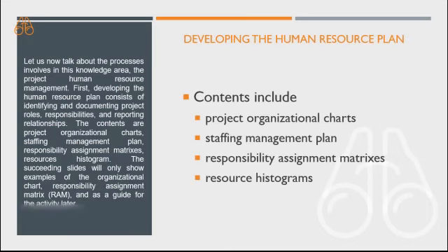Let us now talk about the processes involved in this knowledge area, the project human resource management. First, developing the human resource plan consists of identifying and documenting project roles, responsibilities, and reporting relationships. The contents are project organizational charts, staffing management plan, responsibility assignment matrices, and resource histogram.